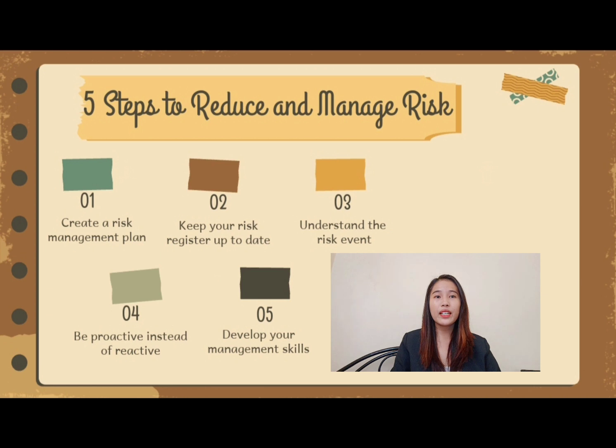Anyone that has experience in project management knows how essential a strong project plan is to the success of the organization. There are many ancillary plans that are often encompassed in this plan, including the risk management plan. According to Emerson, your risk management plan should define your methodology for identifying and prioritizing risk, your risk tolerance, how your team will respond to risk, how you will communicate risk, etc.